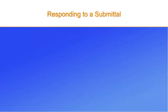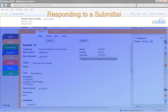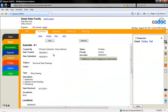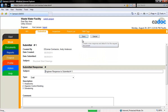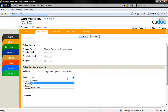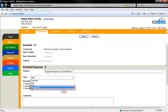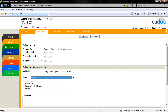In this segment we will address submittal responses. You can respond to a submittal by clicking the respond button. A new window will open where you can create your response. Select the type of response from the drop-down menu. Draft, final, and comment are all similar. Supplemental has the added feature of creating a flag on the original submittal document that lets users know there is supplemental information attached.